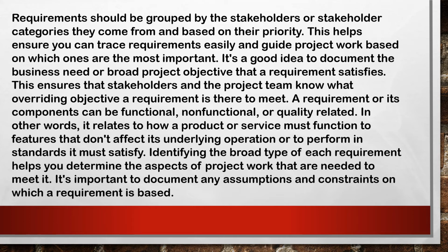This ensures that the stakeholders and the project team know what overriding objective the requirements are to meet. A requirement's component can be functional, non-functional, or quality related. In other words, it relates to how a product or service must function, to features that don't affect the underlying operation, or to the performance standard it must satisfy.